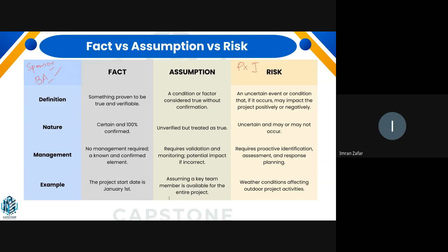And obviously, when we implement some plan or we have a mitigation, let's say we are trying to mitigate some risk or deal with some risk, based on that mitigation plan there is something we might see: okay, this is what we are planning for, but if we do this, then there is a secondary risk associated as well.